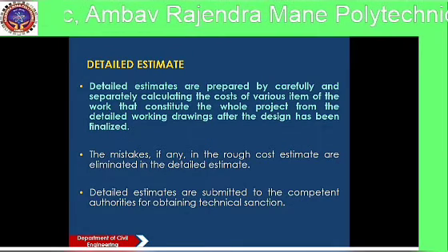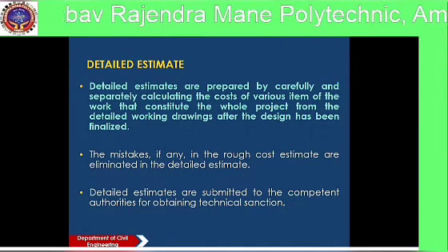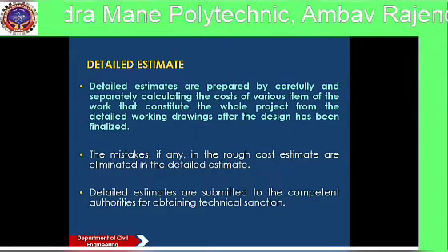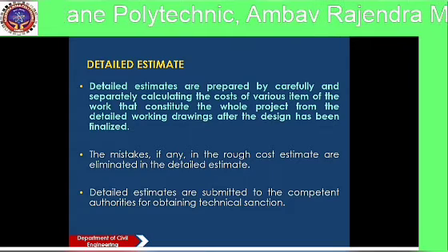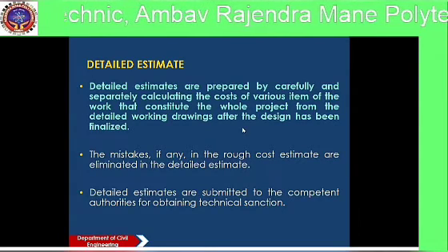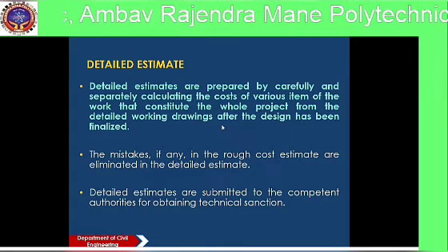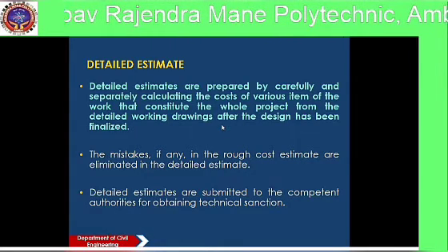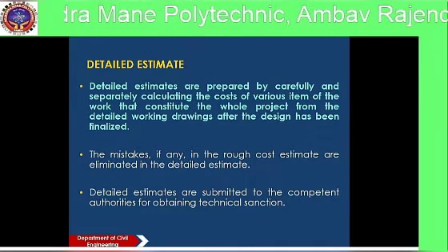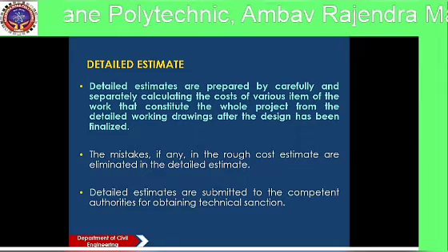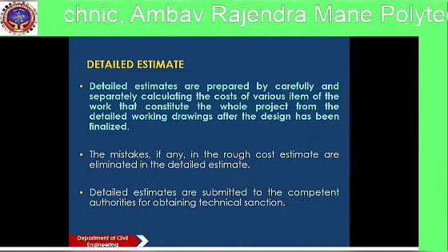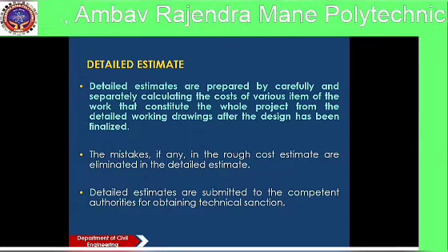Let's see about the detailed estimate. Detailed estimates are prepared by carefully and separately calculating the cost of various items of the work that constitutes the whole project from the detailed working drawing, after the design has been finalized. The mistakes, if any, in the rough cost estimate are eliminated in the detailed estimate. The detailed estimates are submitted to the competent authorities for obtaining technical sanctions.